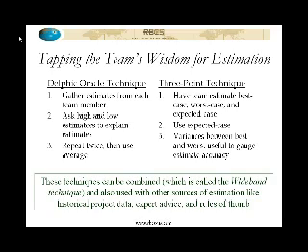We're going to use the expected case as the published estimate. We're going to try to take steps to prevent the worst case from occurring for each task. We're going to try to take steps to enable the best case to occur for each task. And we're also going to look at the variance between the best case and the worst case estimate, because that will give us a sense of the accuracy of the estimate overall. A combination of those would be called the wideband.